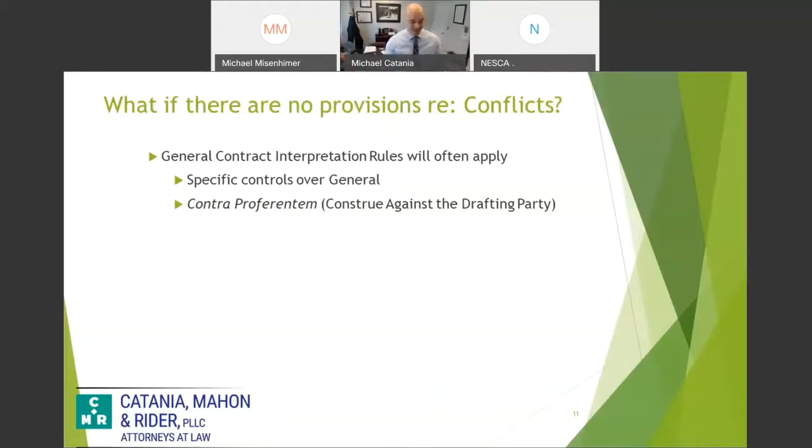You were given the contract and you had to sign it. You're affirming that the contract was jointly drafted and that there's going to be no favoritism as far as how a clause is going to be interpreted against one party or the other, which would normally be the default rule. The owner, as the drafting party, would be construed against the owner as opposed to the general contractor.